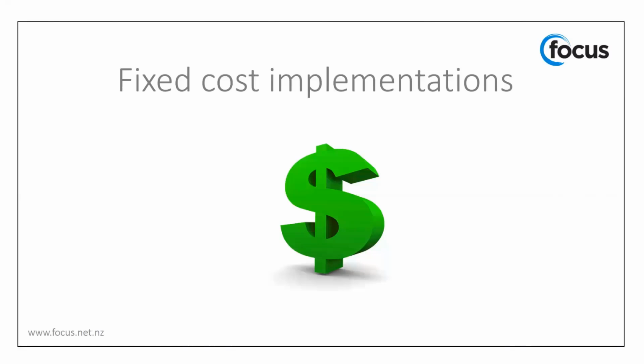Yes, and as an account manager, I'm all too aware that billing is one of those potential areas of contention in an ERP implementation. And quite often, this is simply due to the difference in understanding of what a milestone should incorporate. So for example, the partner believes they have done everything to complete the milestone, yet as the client, you may feel some items are missing.